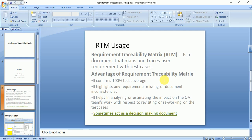If you remember, in the software development life cycle, requirements start very early in the project and then move to design, coding, testing, and maintenance. The requirement itself starts at the beginning, and if you don't have a matrix to capture it, how do you go and analyze the overall project? That's the basic question. We need one document to track and trace everything — and that document is called the RTM.